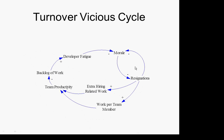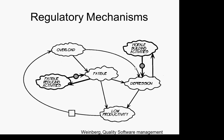There's a loop with four negatives, which is also a reinforcing loop. When we get into those situations, things accelerate. This is one of the key points to carry away — a point managers often miss. Reinforcing loops lead to divergent behavior, lead to instability, lead to things changing faster and faster. They may be changing for the good, or they may go south in a bad way involving morale and resignations.